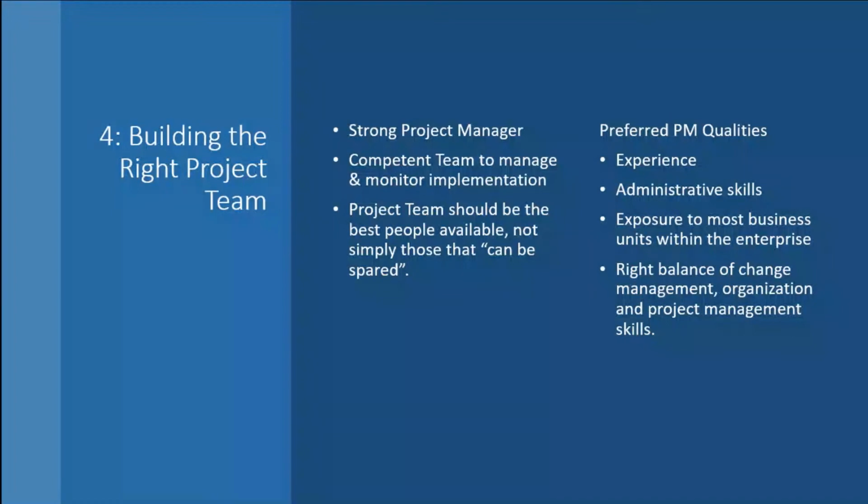Building the right project team. So one of the key things is you need to have a team at each of these units you are going to implement. And you need to have a strong project manager. Does he need to be an IT guy? No. Does he have to be a business guy? Definitely yes. He or she needs to know the business inside and out, be a process champion, and be in a position of authority to get things done. These are very, very crucial characteristics of a good project manager.